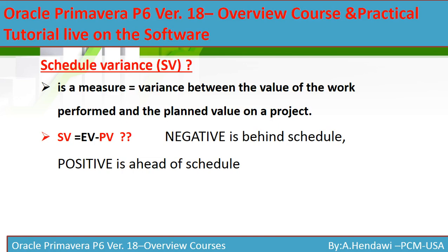Schedule Variance (SV) is a measure between the value of work performed and the value of work planned. SV equals Earned Value minus Planned Value. All variances start with Earned Value, then minus the actuals or plan. If SV is negative, you are behind schedule; if positive, you are ahead of schedule — meaning what you have earned is more than what you have planned.